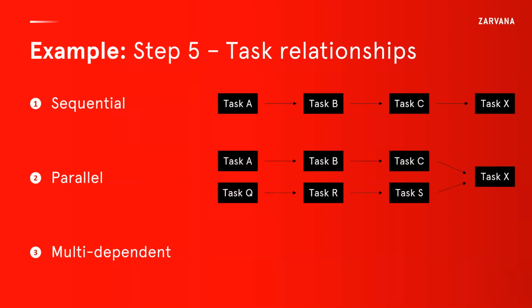Parallel: here you basically have 2 different work streams, or projects, happening at the same time, and then eventually they come together. An example, using our building of the house example: if the owner said, build a house and build me a barn in the backyard, the construction of the barn can happen in parallel and simultaneous to the construction of the house.